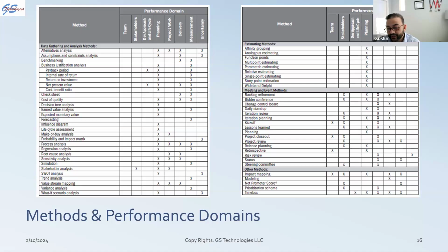Now, before that testing, I need the construction phase, which will take at least 2 or 3 months. If it takes 3 months, then I take 3 months on that one. So back from October: August, September, October, right? So on 25th of July, I have to start that work so that I can complete it in 3 months, by 25th of October. And then that will give me another time.